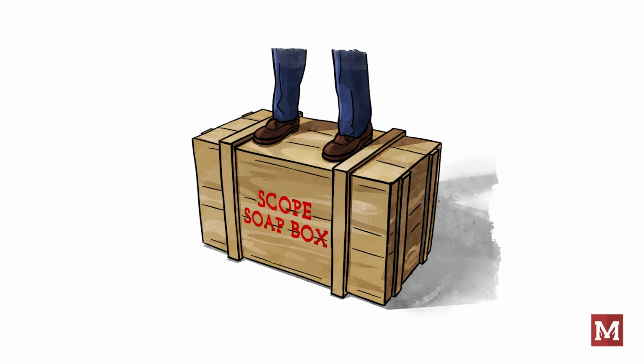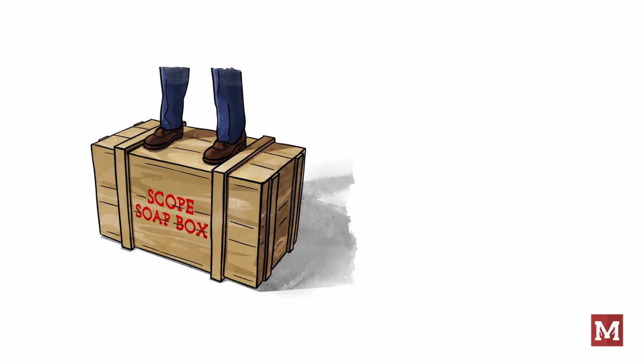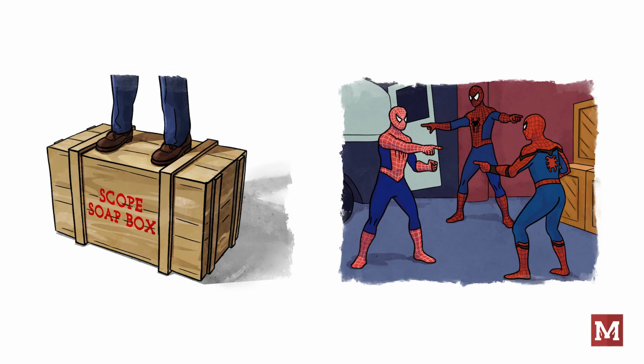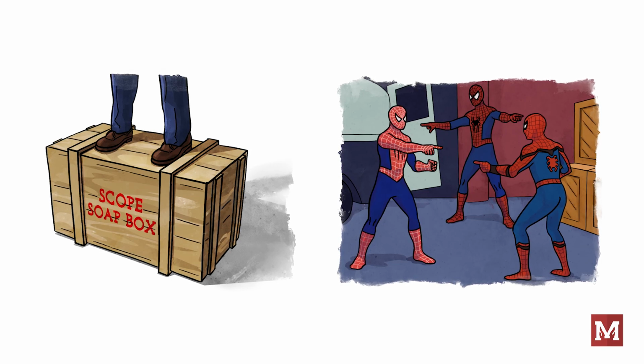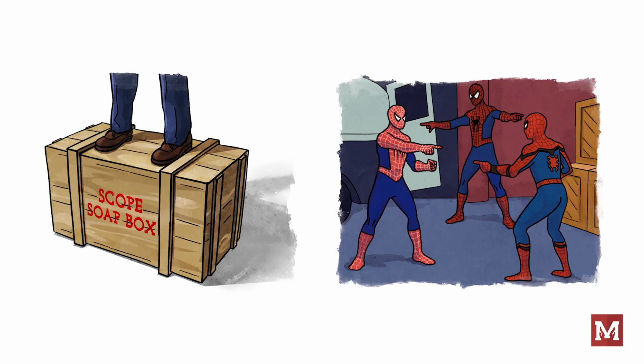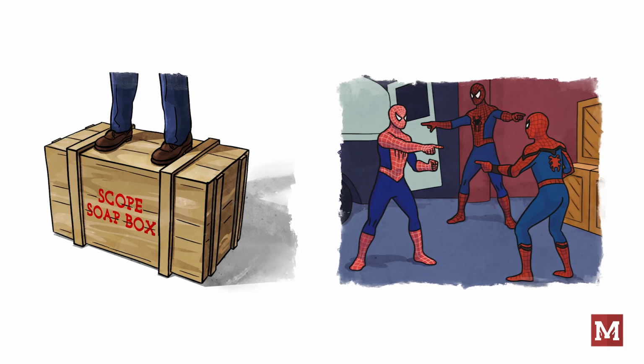So while I'm here on my scope soapbox, if you haven't heard this advice yet, avoid the term "by others." It's a trap. Who is "others"? Is it the owner, the general contractor, or the mechanical contractor? Who knows? In order to communicate the scope effectively, nothing should be left so open-ended. If we don't name the other, then we haven't defined the scope.